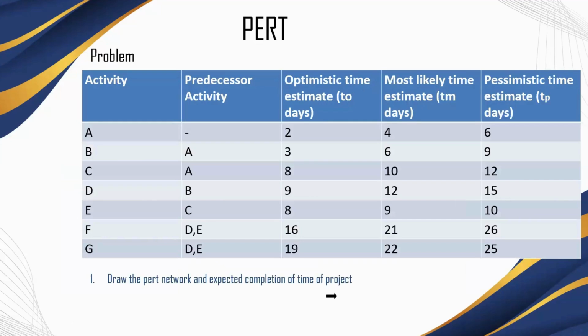For the PERT problem, as we know, the optimistic was the earliest started. Before that, we will see the difference between the PERT and the CPM. In PERT, three estimates are used to perform the weighted average of the expected computations of the time of each activity based on the probability distributions of the completion timings. It is basically a tool for planning and controlling of the activities.